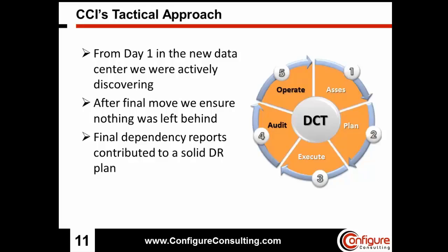When it came to the end of the migration, once the final move event took place, we continued to discover the previous data center to make sure that everything that was left behind was supposed to be left behind. Once those lights go out in that data center, we don't want any surprises when all of a sudden an application no longer is communicating with its database because that database was left behind. So we made sure that everything still remaining was on the decommission list.